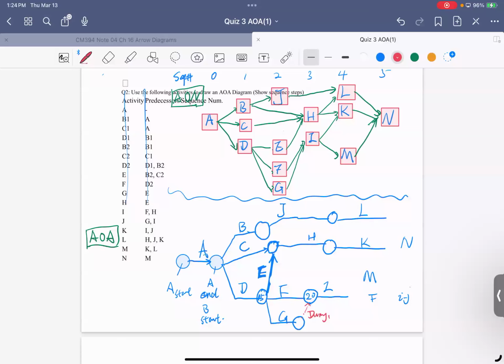If we use a solo continuous link for this, then you make a new activity, but we do not have this activity existing in the list. So in this case, you try to make a connection from this node to this node, but you do not want to create a new activity.